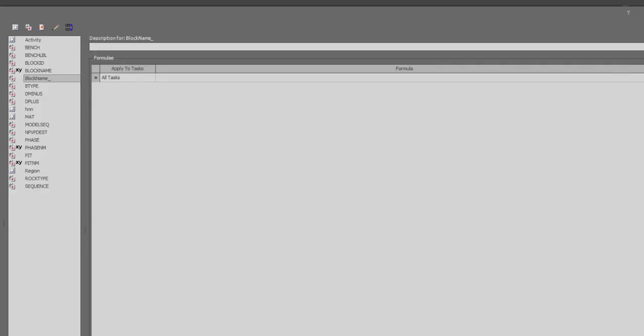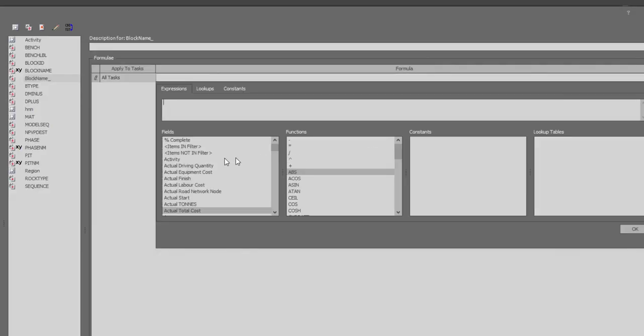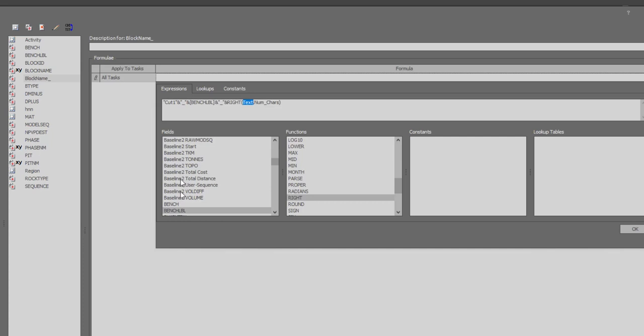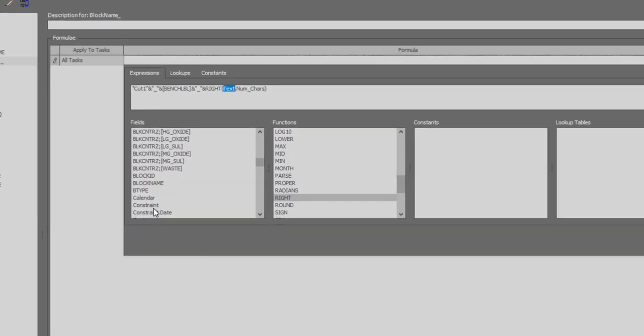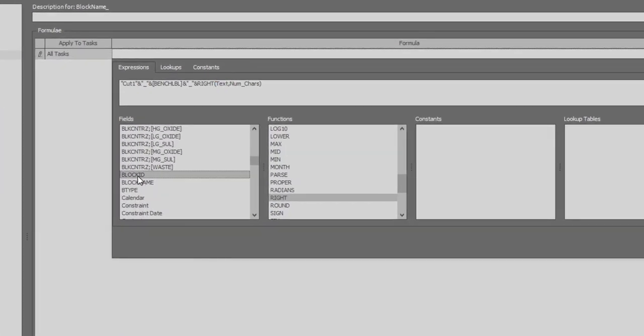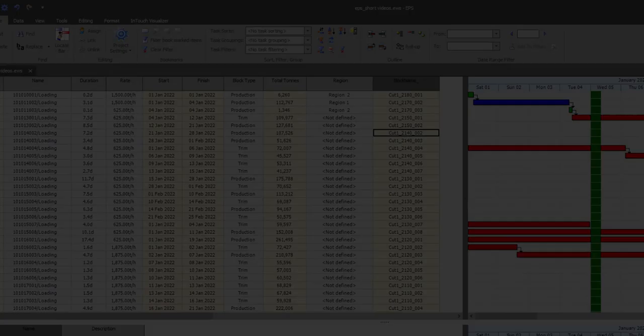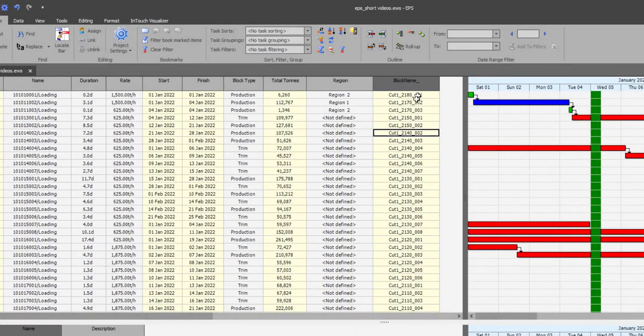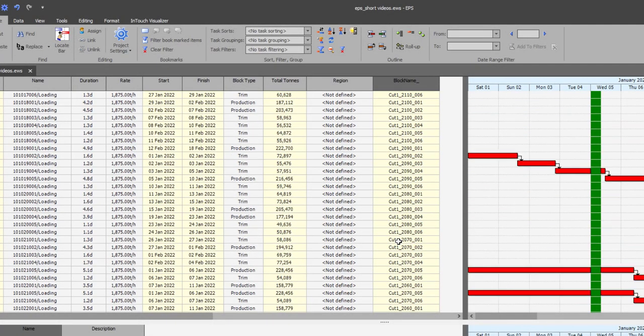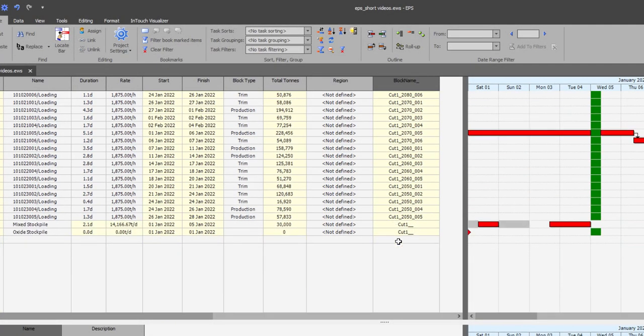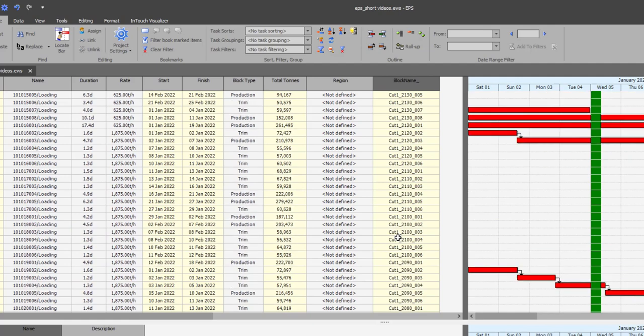I will now define the values for each block name text field using a formula. The formula is set up to pick up the pushback name, the bench elevation, and the unique block number. You can now see that the block name values are calculated from the formula based on existing fields.